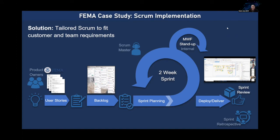We do have sprint retrospectives every couple of months, and we've changed a lot of things about our process based on feedback from those retrospectives. A lot of great ideas have come from team members about how to make things more efficient — for example, incorporating the ad hoc task request into our sprint planning. So far we've been really successful.